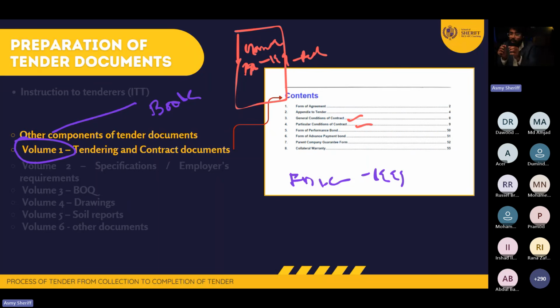And another document, small document I'm going to prepare. In that document, I'm going to put all my changes. Okay, payment, this clause number 13 point so and so thing, change it to this. Clause number 14.2, changes to this. Clause number 8, these are the wording should be changed. This one should be deleted. This one should be included.